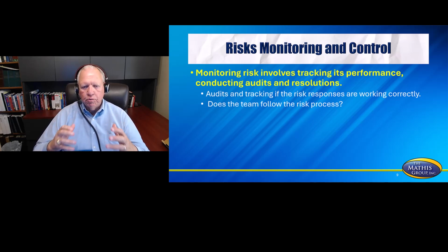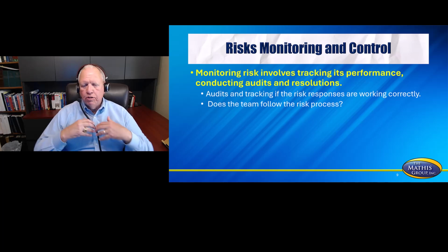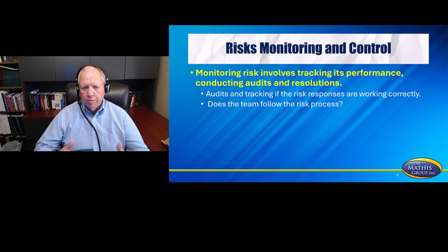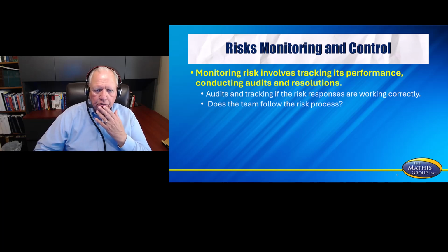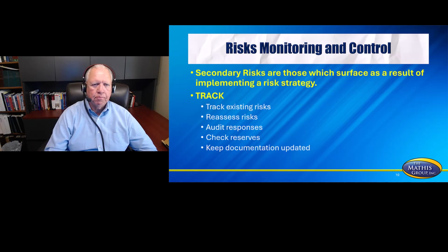And so one of the things you want to understand is on the traditional side, this is where this is going to happen more because you've got a risk management plan. Your team is monitoring every aspect of that risk. You're doing audits on that risk. On the agile side, you're only talking about risk if it happens from a contingency standpoint because you're running it in a 2-week sprint. And so you're talking about some of the risks, but you don't have this massive risk management plan on the agile side.